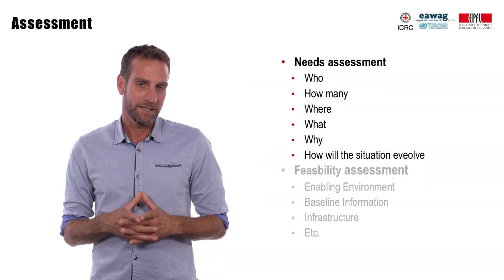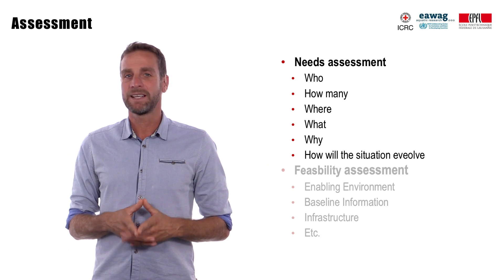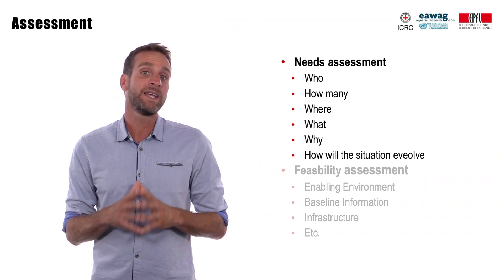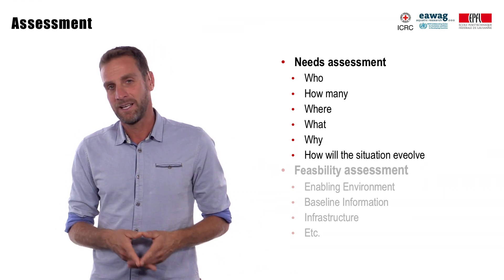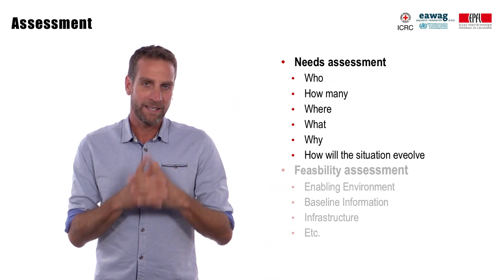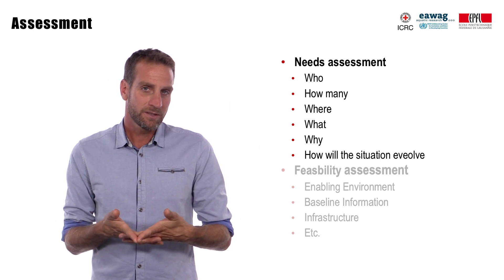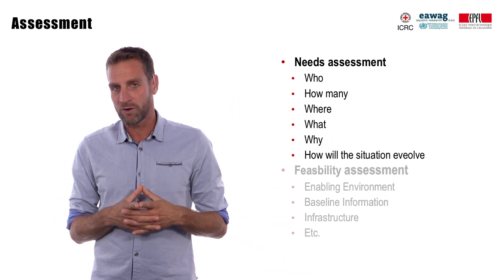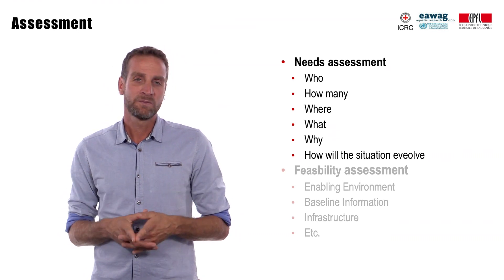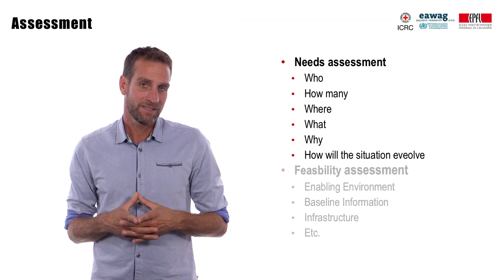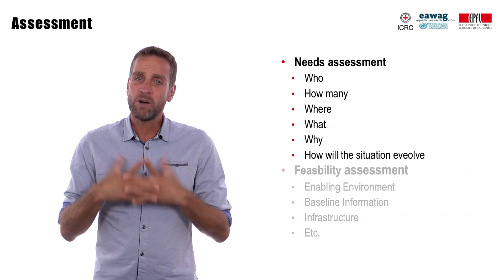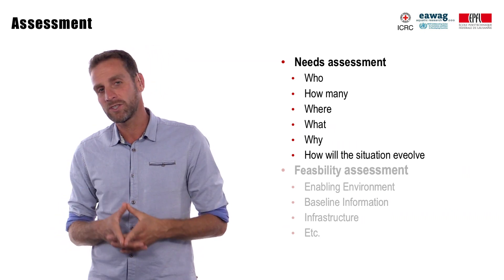There are different types of assessments. The needs assessment does not aim to identify an intervention, but to find out whether or not an intervention is required based on identified needs. Such assessments should at least provide information on who is affected or concerned, how many people are affected, where they are located, what the issues are, and why they are affected. You should gather information on the causes, risks and vulnerabilities, coping capacities, and finally, how the situation will evolve.